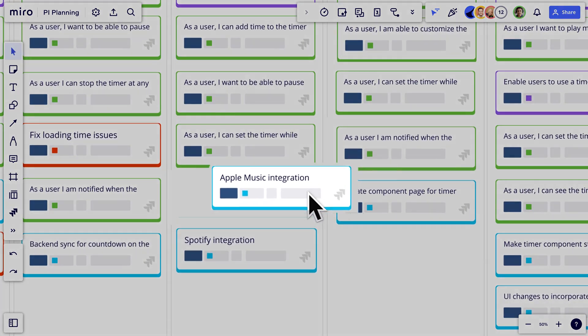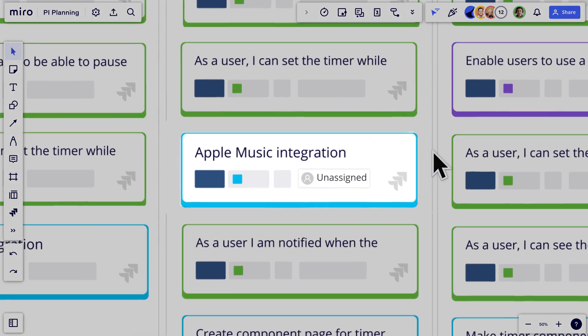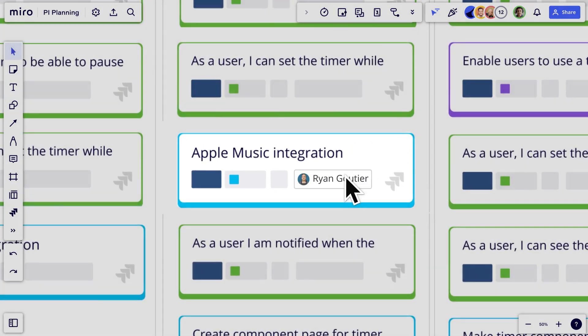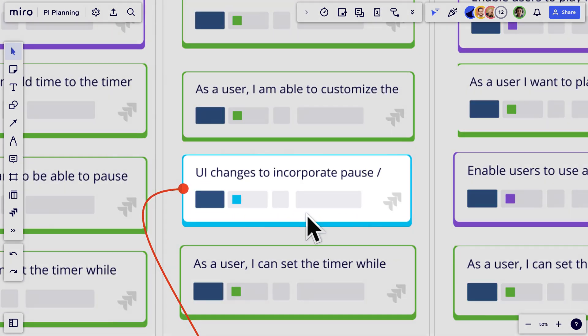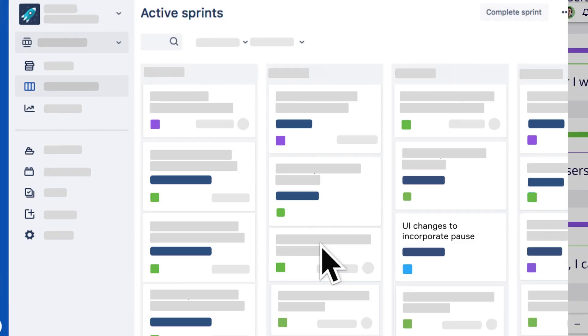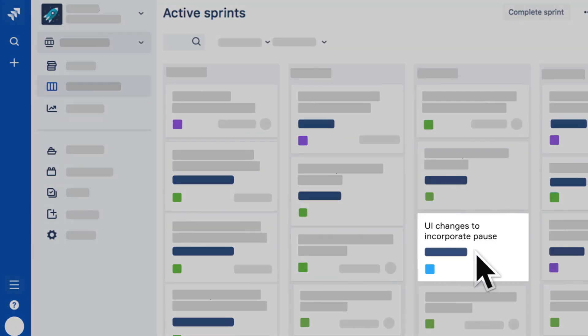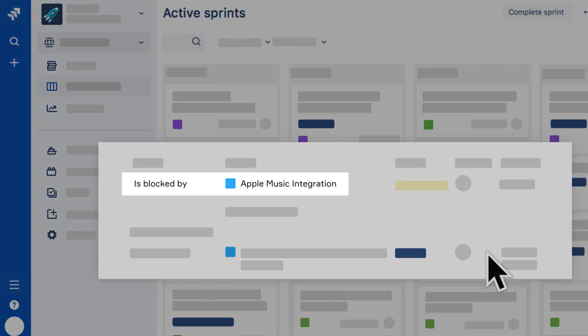As we move cards around, update them, and map dependencies, it's all automatically updated in Jira in real time. And that brings us to our second topic: dependencies.